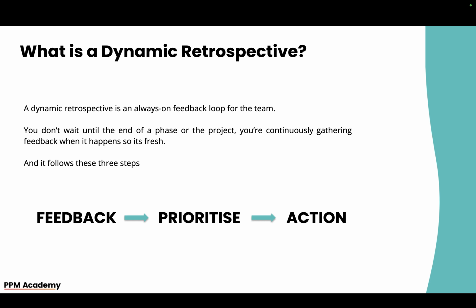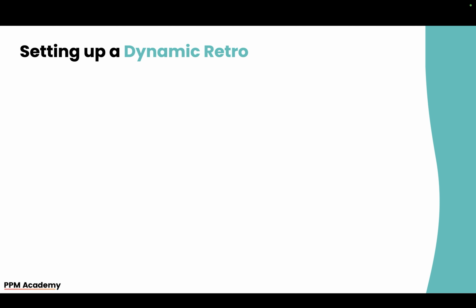So very similar to any other retrospective, but the difference here is you want to be gathering this feedback much more dynamically, not waiting till the end of a sprint or the end of a phase or the end of a project, where in some cases frustrations can build up and you may have a new problem because they've had to deal with that problem for far too long. And by the time you talk about it, it's too late. Someone's had enough or it's turned into something else. So it has a compounding effect.